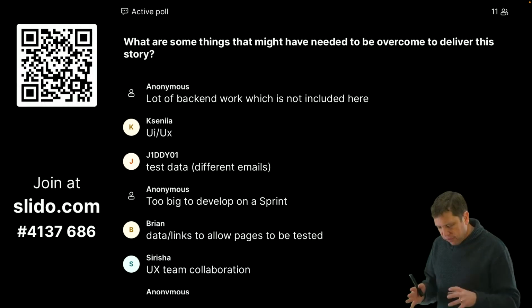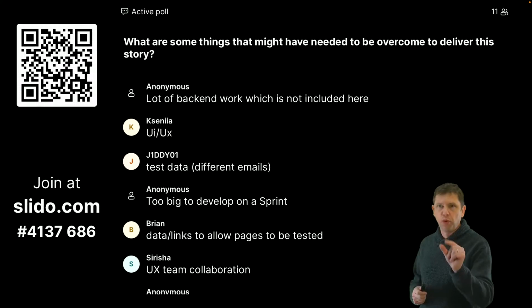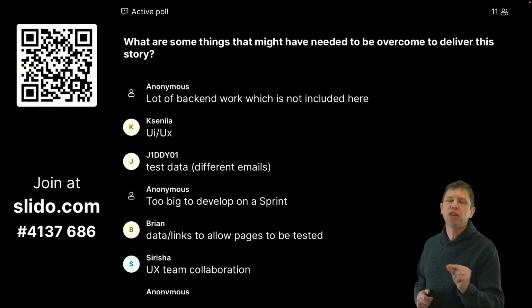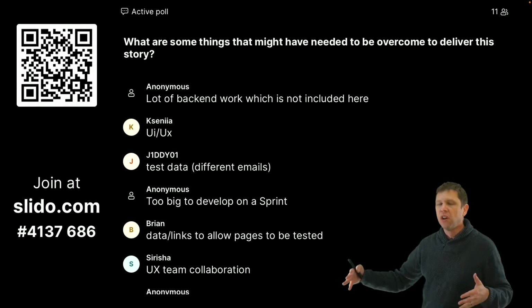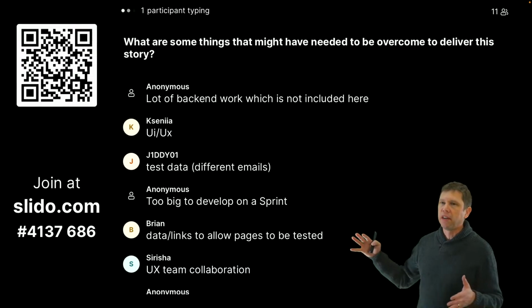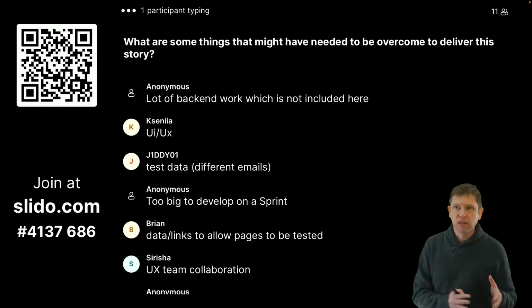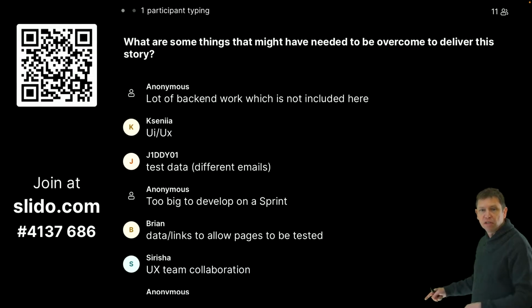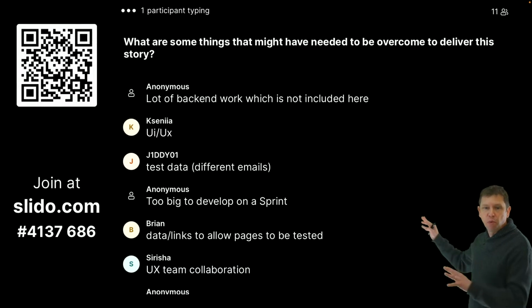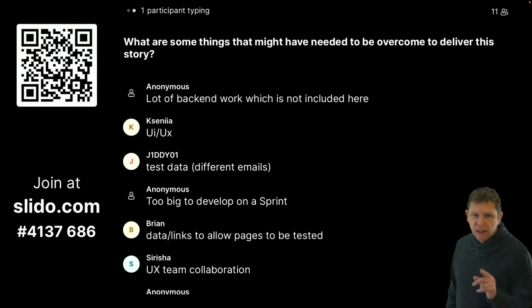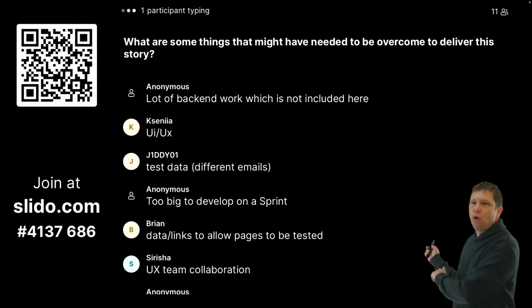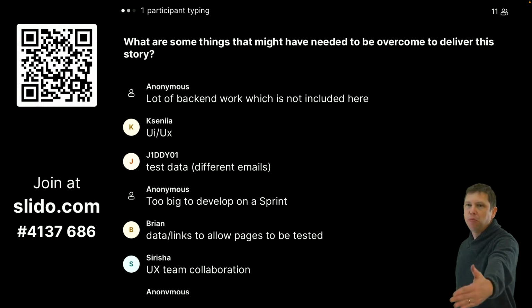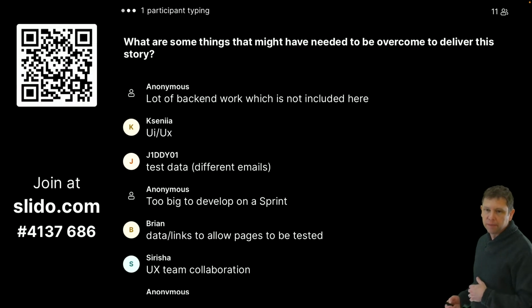It may sound insignificant, but teams I've seen that take this really, really so small it seems stupid approach are much more successful than the teams that try to get 2 weeks worth of work and then they get to the end and then discover that there's barriers. So the smaller you can make those early stories, the lower your risk is going to be because of all these types of things, right? There's all these things and every place is going to be different in what those risks are. And chances are the risks that you guess about, there'll be even more that you haven't discovered. So trying to get it all the way deployed through is one of the best ways to lower that risk.